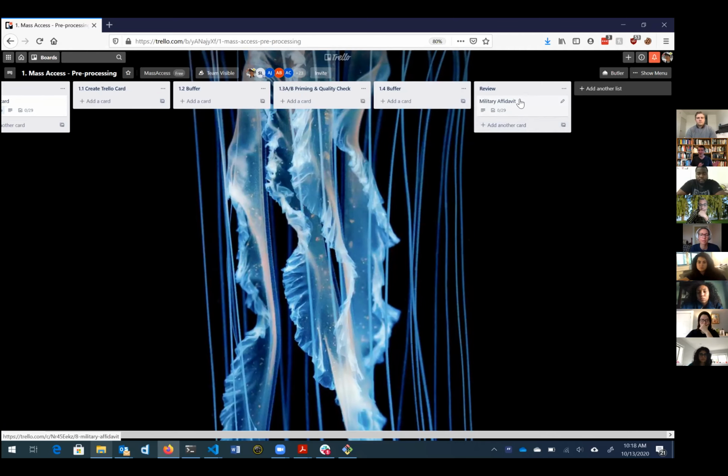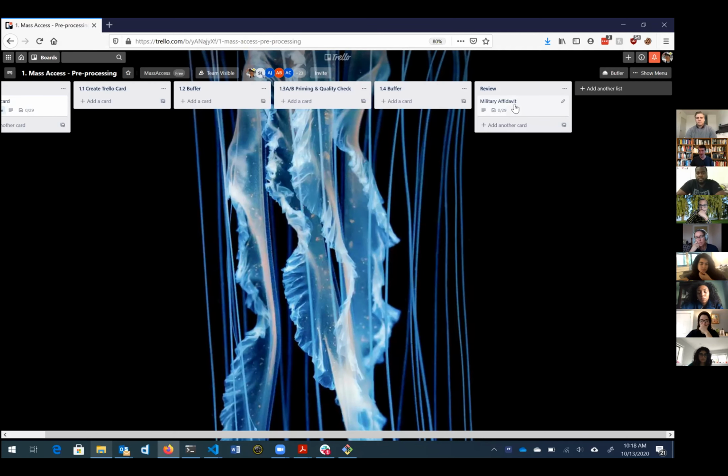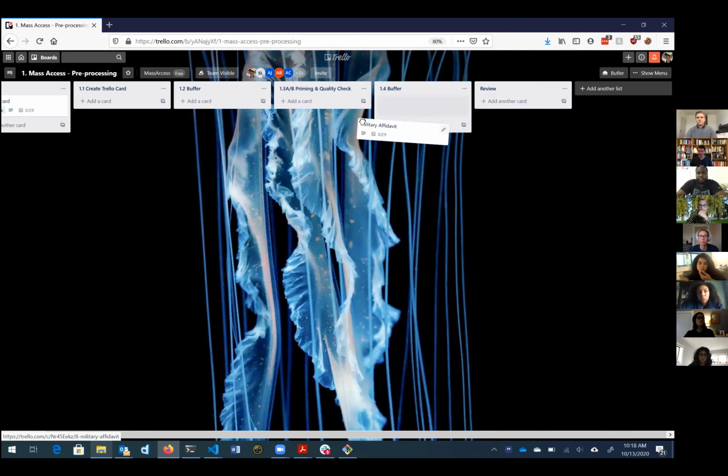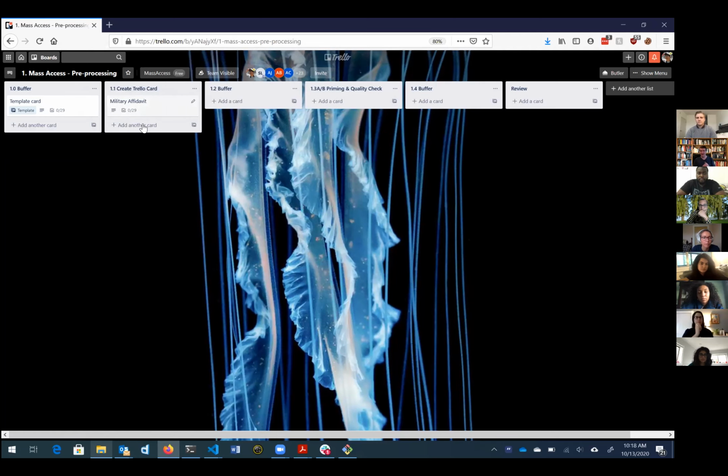And that would allow you then to see bottlenecks visually. So if everything's getting bunched up in one vertical, you can say, oh, well, that's where the bottleneck is. And so then management could come in and everyone can all hands help to get through that bottleneck. And it was a nice way to help make sure that you had just-in-time manufacturing working by eliminating bottlenecks. And the software industry has really adopted this as a process as well, and they tend to think about it as individual features and you move them through.